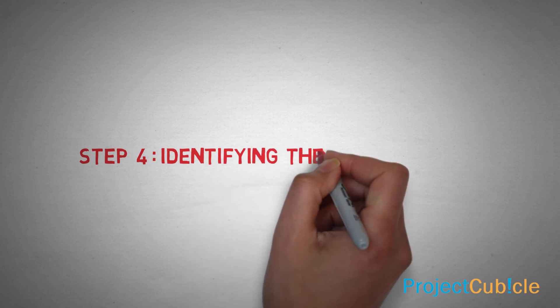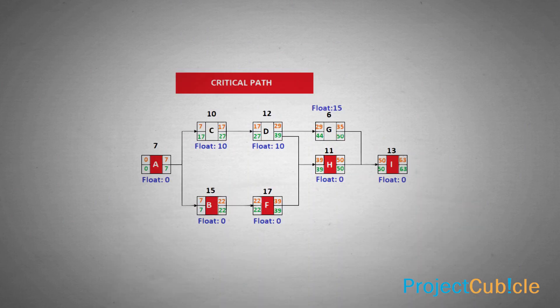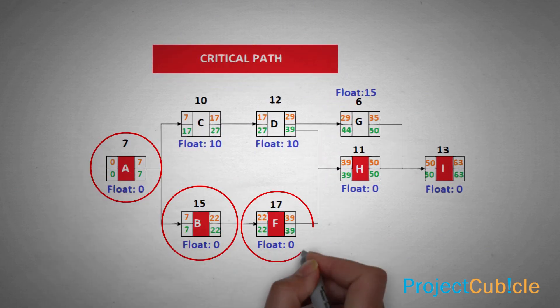Step 4. Identifying the critical path. The critical path is the longest path in the network diagram and the total float of the critical path is zero. In this example the critical path is on the A, B, F, H, I activities.